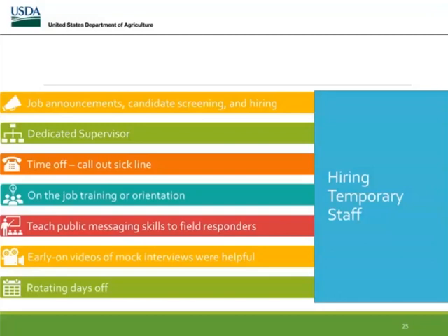So that's sort of how we handled it. The rotating staff typically do not get sick and take time off during their rotations because we're permanent staff and we're there for a temporary time. But the temporary staff who are hired locally are there the whole 2 years. They don't actually get time off. And so we did end up later on in the incident going from 7-day work weeks to 6-day work weeks for local staff, just to allow them to have a rotating day off throughout the week and not burn people out.